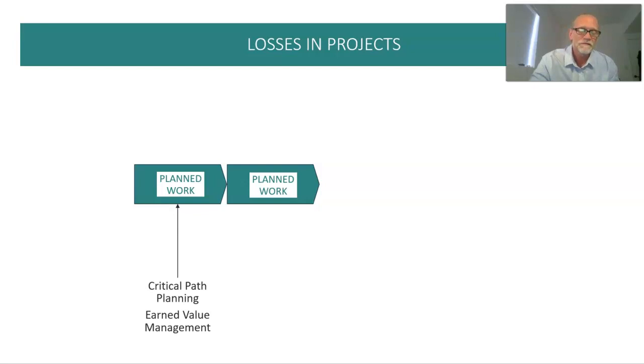But in execution, what we find is oftentimes those priorities won't all be aligned, and the overall project plan may not be easy to maintain or update, especially when there are changes and variation occurring. So these resource managers will rely on their own individual plans to help their resources manage priorities and get things done, which makes sense. But when that happens, the coordination effort that comes from having an overall integrated plan begins to break down.